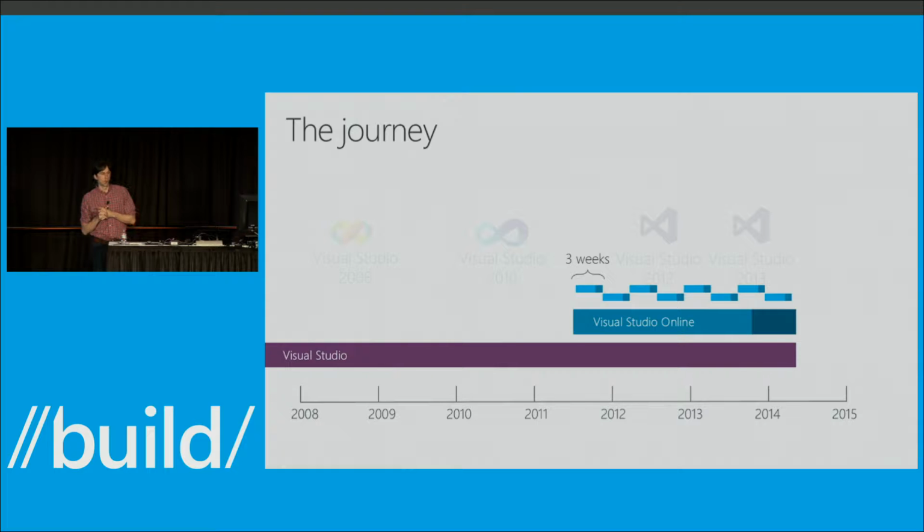Our teams are anywhere from 10 to probably 12 people. Each team is made up of 3 different roles, primarily devs, QA, and then a program manager. A program manager would be analogous to a product owner in Scrum terms. The ratio of people on that team would be somewhere in the neighborhood of 5 to 6 devs, 3 to 4 QA people, and 1 program manager.